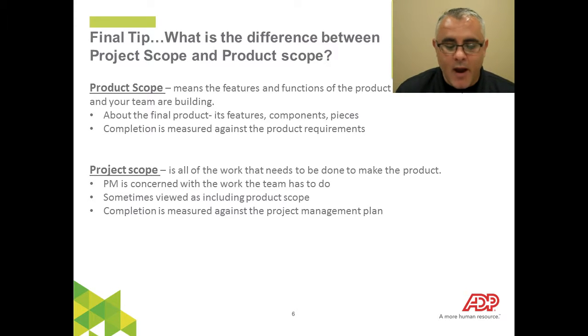Those are two key terms you're going to see quite often, and because they look very similar, as you're reading lengthy questions, they may throw in something about product scope and then throw something in about the project scope, and then the question is actually asking you something about product scope. And then the answers are going to be a blend between an answer talking about project scope or product scope. I know it just sounds really crazy, but you've got to pay attention to how your questions are written. So the difference: product scope defines the characteristics, the functionality, how that item, service or result is to perform, and project scope is outlining all the work, the scope of work that will be performed.